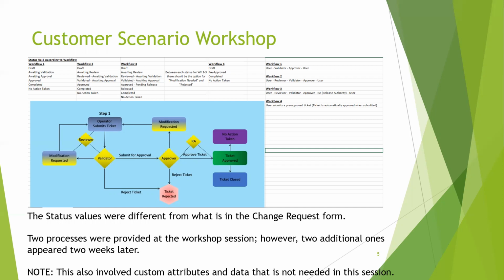And during those processes, the reviewer and the validator also had to have permission to modify the change request at any stage. How many of you use change management today? Can you modify a change request if it's in the request for authorization stage? Cannot modify the field. So it's very hard to do in that capacity. So my proposal to them was, if it's in that stage, they need to make a change, reject the change, and go back to draft, not to reject it. Then they can make the change to whatever fields that they want to do in that capacity. And then it goes back through the whole process, because whatever they're changing has to go back through those that already saw it. Now they have to see it again because it is a change functionality.